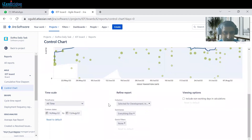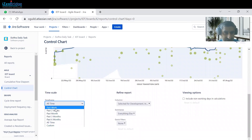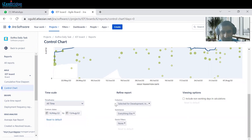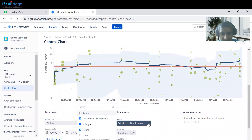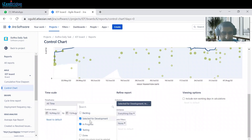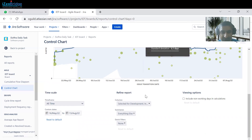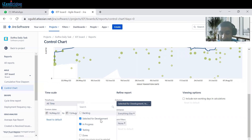You can also refine this chart — you can update it based on the last two weeks, past month, three months, six months, or all time. Currently the status is set to all time. We are getting this control chart because we have selected the statuses: Selected for Development, In Progress, Testing, and Done — not the Not Done status, because that would increase the time. So only three active statuses are selected, and when all items are done, the standard deviation is calculated based on that.